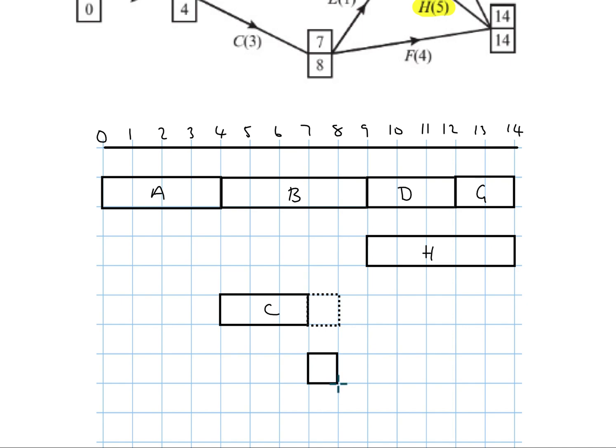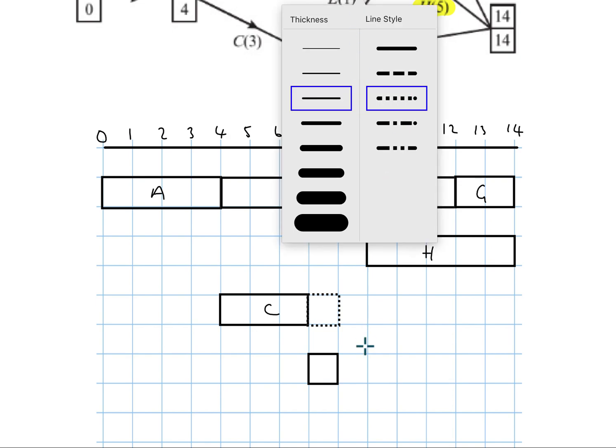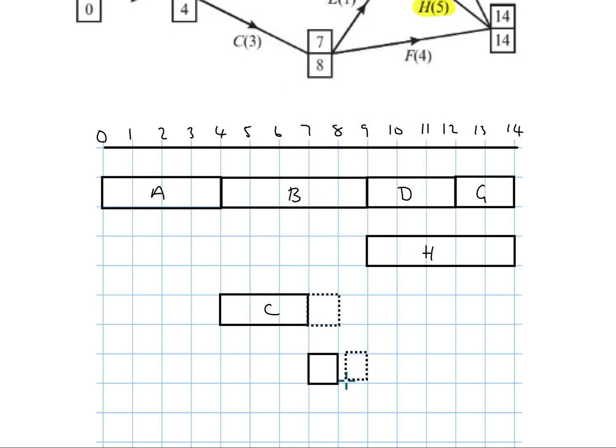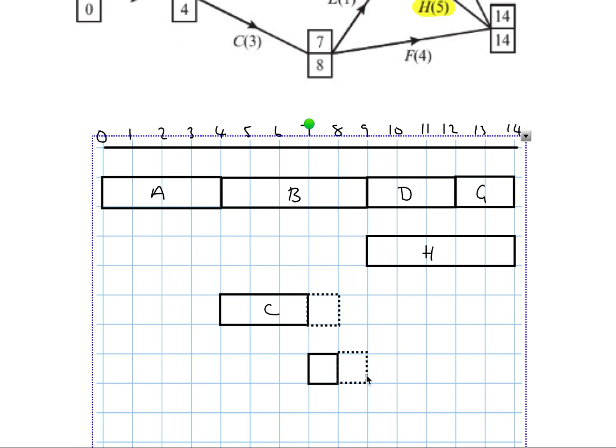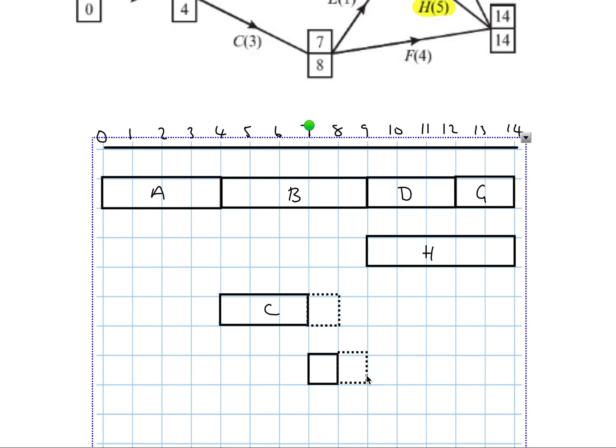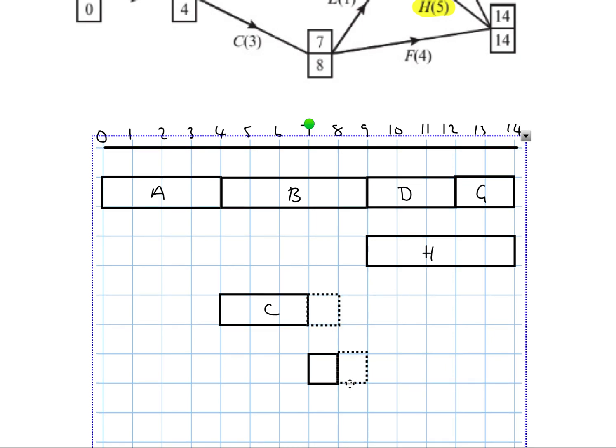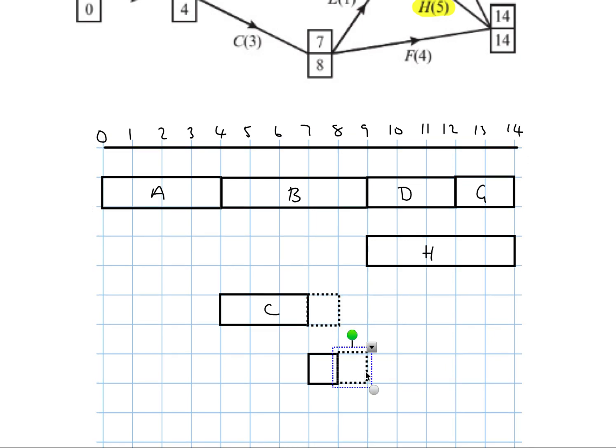It takes 1 hour, but can be finished as late as time 9. So E also has 1 hour of slack or float. So there's E going in there.